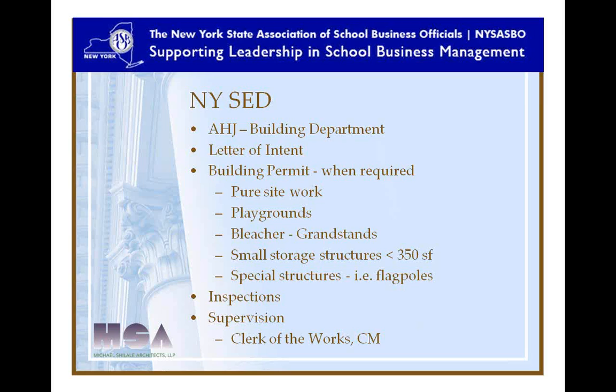Many districts use a clerk of the works or a construction manager, a CM, to provide the district-required supervision, just to have that extra set of eyes there, usually on smaller projects under $1 million. A district can do it with their own facilities people. But as the projects get larger and more complex, most districts bring on a third-party construction manager, or they ask their architects or engineers to provide additional site inspections and supervision.